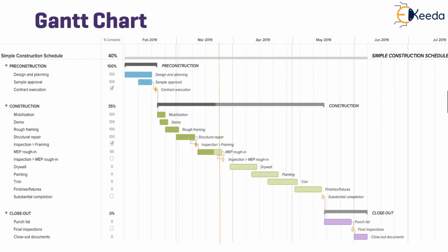Relationships between each of these activities, output, percentage completed, can also be tracked as per the date. In this schedule, you can see the percentage of the project shown is 40% complete. That is through easy determination of its underlying sub projects and then its activities.